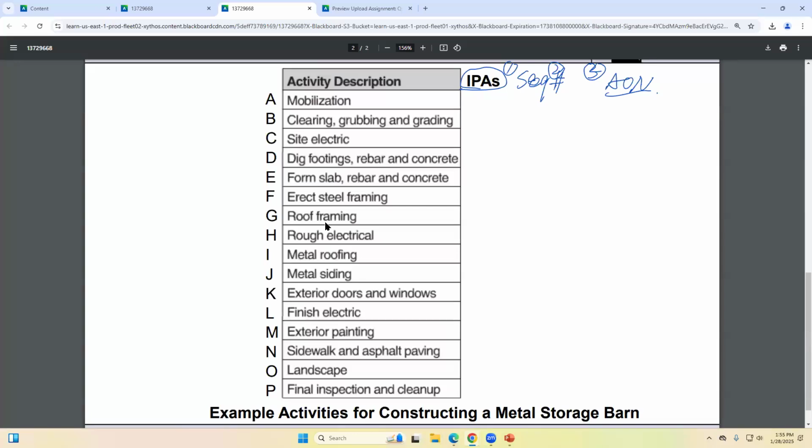B, C, and D are all there, because B, C, and D all follow A. Hold on, let me write that down big, because I want to make sure. Some things should be done at the same time, but for other things there is a predecessor that has to be done first. So there can be several things at once, but you can't start two.